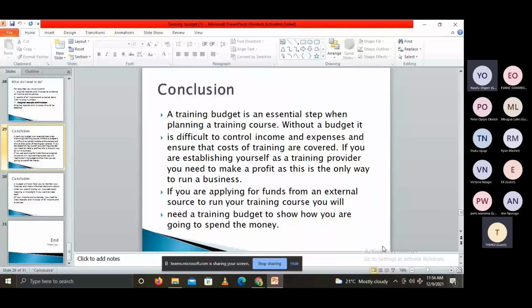As a good budgeter, or somebody who understands the budgeting process, you must know how to cater for risks. And it is very simple. You look at the history. What has been the fluctuations in the past? Could be in the last 5 years. Now incorporate that. You input that when you are estimating your cost. You can do what we call a scenario analysis. A scenario analysis is to say, these are the possible scenarios.